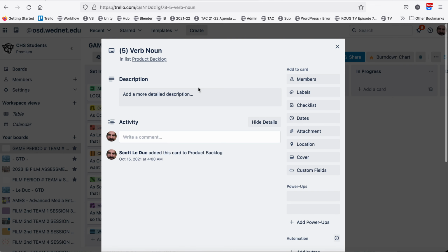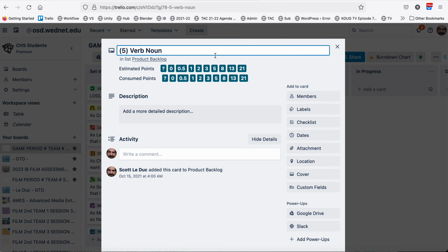What this means is that when I click in here and I click up by the title and wait, you get a row. Now you want to select only from this top row. This is your estimating when your team takes the Fibonacci cards and looks at how complex a task is from 1 to infinity. We are using up to 1 to 21. 1 would be one person working 5 to 10 minutes. And a 21 would be your whole team working together for a day or two potentially. I mean, a really big kind of thing.